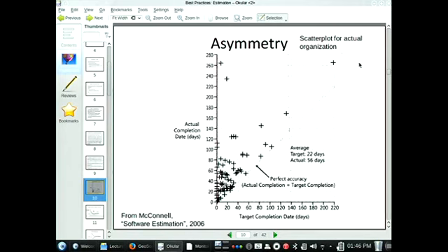So in this particular case, what it seemed to promise, based on what you could read about it online, based on the marketing that was available, was that it would fit the job. It would allow you to deliver on all the needs. And once you actually get into it, once you fight with it, and once you work with it, you find that it doesn't work with this version of Oracle that you're working with. It doesn't work with this current version of Java that you're working with. And you end up saying, well, okay, let's switch versions of Java. And then that ends up breaking this library. And then you've got to go see if you can find a replacement for that.